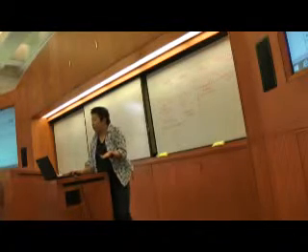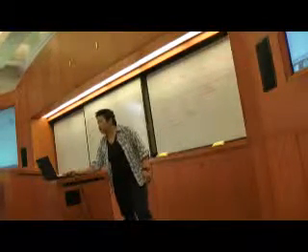So, with that as a backdrop, you then talk about some of the indicators, like how do you verify those indicators? But let's not do indicators now, given all our state of mind. What we want to do is use your needs assessment as a foundation to design your project. To design your project, you need to figure out what the activities are that I'm going to do to bring about that goal. And in addition, what is my work plan? When do I do what activity? So the first thing we need to do is design. Think about what some of those activities are.